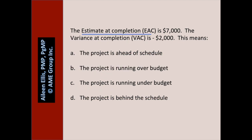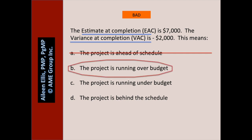The variance at completion is negative $2,000. This means — is this about cost or schedule? It's about cost. Is it good or bad? It's bad. A negative variance of $2,000 means we expect to overrun by $2,000. A: the project is ahead of schedule — we have no idea. B: the project is running over budget — yes, and we expect to overrun by $2,000. C: the project is running under budget — false. D: the project is behind schedule — we have no idea.